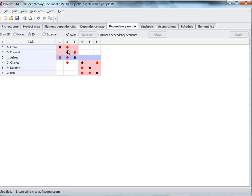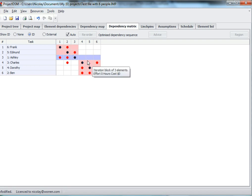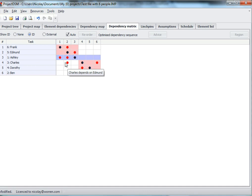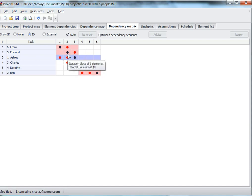And here it has been restructured. So you see that Frank, Evan, and Ashley comprise one cluster here, and Charles, Dorothy, and Ben are in the second cluster, and there's one dependency. So the output of the work that the first team does is this dependency here, which is the input for the second team. So basically, the first team does analysis, and the second team does design work in this particular case.